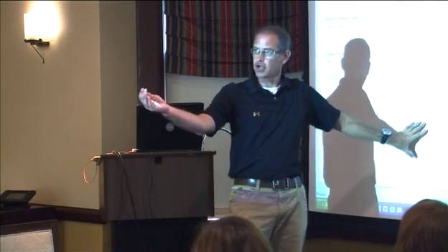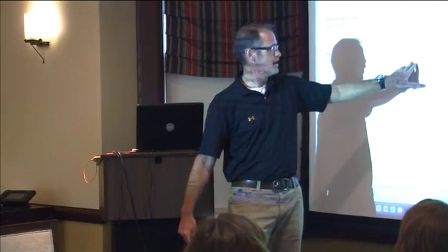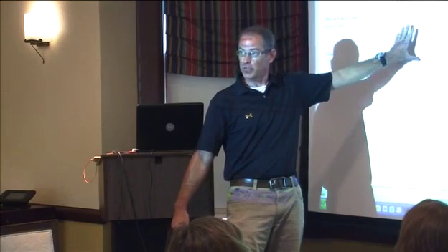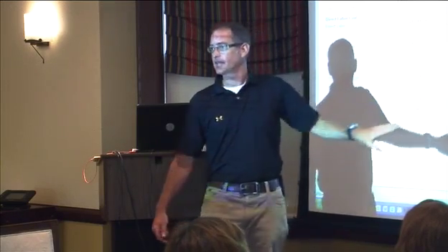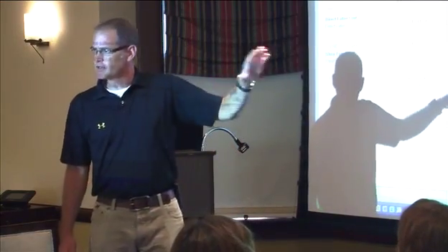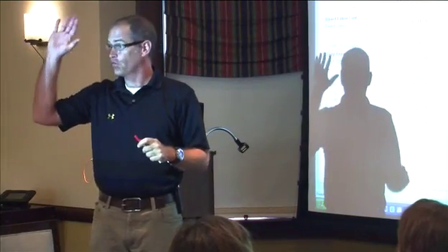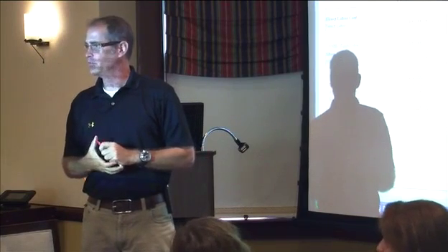So the percentage we were talking about, if it's wrong, it's wrong, that's going to show me right here, because I might have $240,000 expensed up into the job cost, and I'd be able to see here that there's a difference of $10,000, so I'm underallocated. If I put 22% on these jobs, I would then be overallocated, right? I'm taking too much up to the jobs. I'm over-expensing the jobs for the overhead. Same thing we talked about, the equipment and the profitability, right?